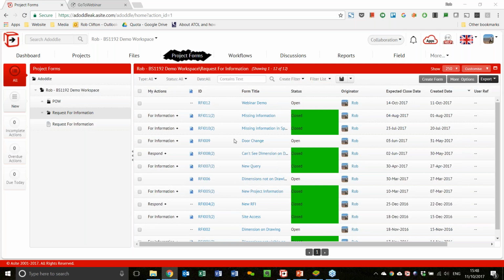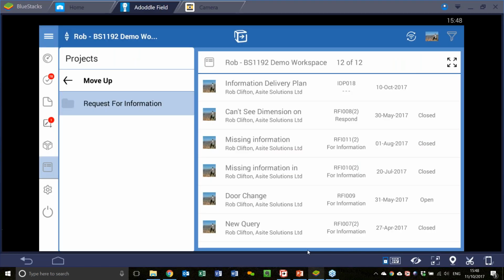And then I'm guessing, because there's a question here saying, could you issue a non-compliance form? Because you're creating forms on the fly, this would be possible, right? Of course, yeah. As mentioned, the flexibility to build your own forms allows you to build an NCR into the system and be able to raise that and have a workflow pushed straight from the app. So the same procedure I did in raising that RFI, I could use exactly the same approach, just be an NCR and assign it to a different person to perform a different task, for example.